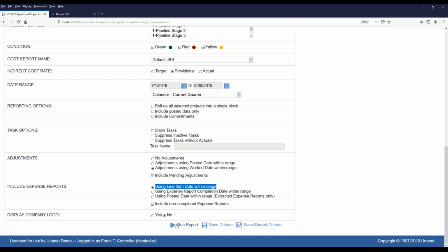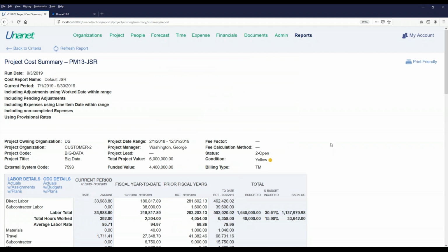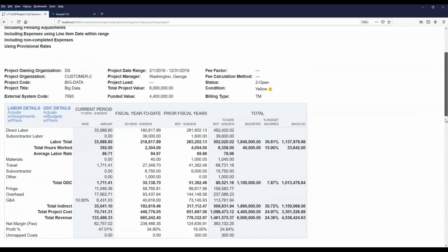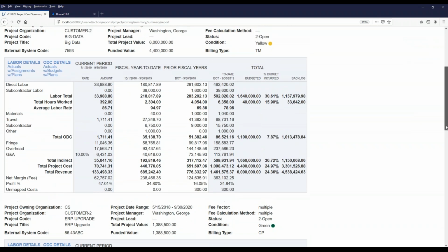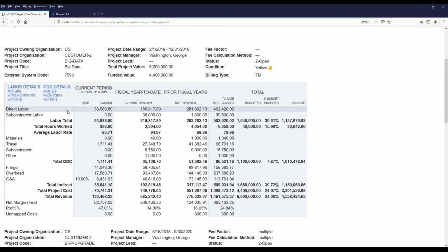And it's that easy. Now, in this case, we'll pretend we're again a project manager. So we're going to use that real-time data. What that means is that, for instance, with labor, as I run this report, if one of my folks just entered some time literally 3 seconds ago, those hours are included in the totals here in the raw labor cost, and that then is being burdened with fringe, overhead and G&A, showing me exactly where I am to this moment